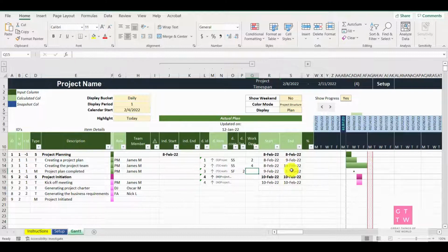So now just to show you that this is now not dependent on this. If you want to make it dependent on the previous one, you just select the proper dependency. In this case it is 2 days, but here you see that there is a lag. So if you remove the lag for 2 days, it will shift 2 days later. Oh sorry, it was workday, not the lag. So I can add the workday. The dependency was not finish to start, it was start to finish, that's why it was coming before.